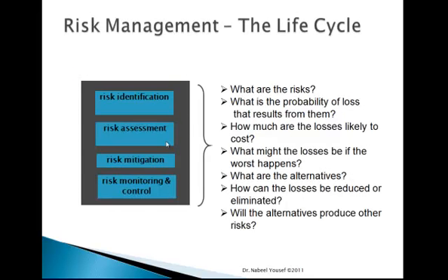In risk management, or dealing with risk, we first identify the risk, then we assess the risk, then the mitigation of the risk, and monitoring and controlling. So we ask some questions to get this information.